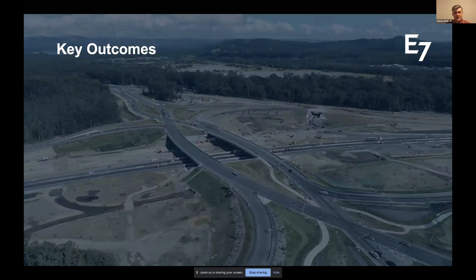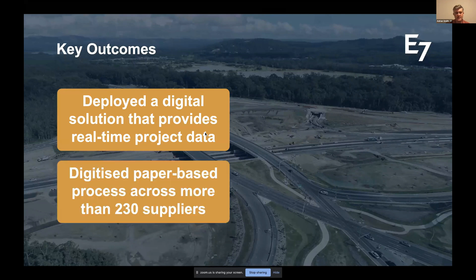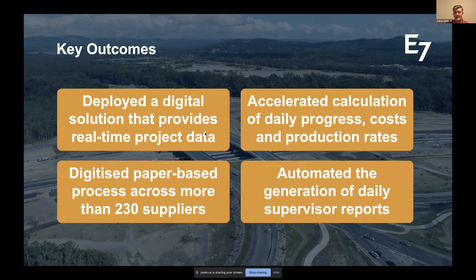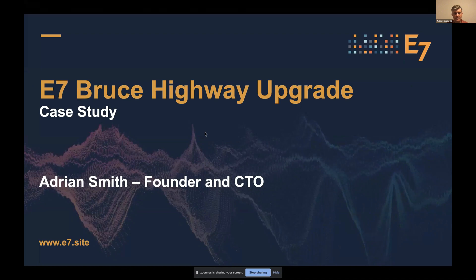To wrap up, the key outcomes on this project: we've deployed a digital solution providing real-time data for decision making; we've digitized a paper-based process across more than 230 supplier companies; the process has accelerated calculation of daily costs and production rates — by 10am the next day, teams know what they spent and what physical progress was achieved. We've also generated a large volume of automated daily reports giving supervisors actionable insights. I'm Adrian Smith — thank you very much for the time and opportunity to present.